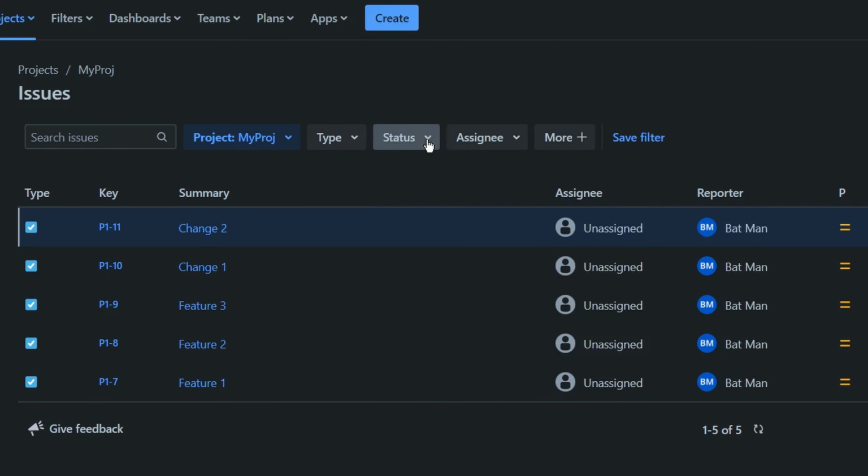What does all this give us? This helps to understand when new stuff is popping up, whether it's within the budget or not. So you can communicate that in time with the respective stakeholders. If a change is high priority but not in the budget, it can help finding candidates to cut. For example, you could search for tickets that are still to do and in scope.